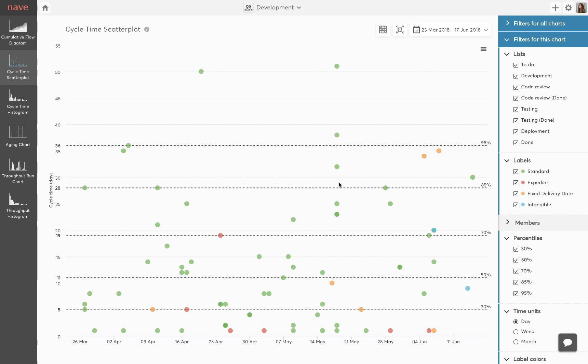When you're forecasting delivery times to your stakeholders, ask them what kind of probability they would be most comfortable with. We recommend you start with the 85th percentile when defining service level agreements.